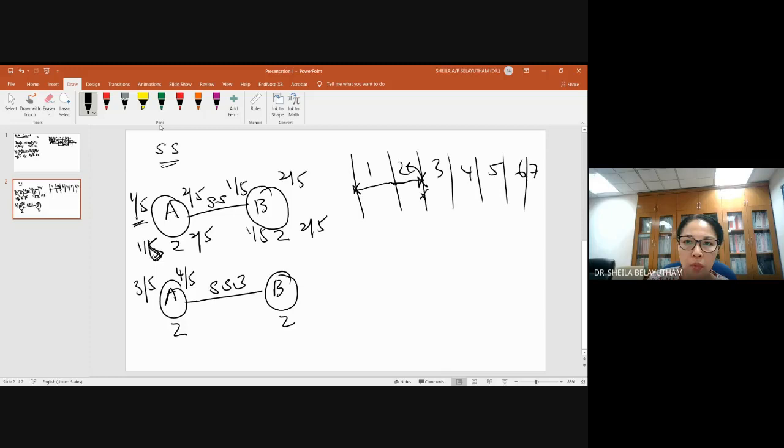Alright, so we start here. Okay, so start to start 3, which means B will start 3 days after activity A started. So activity A started here. 1 day, 2 day, 3 days. 3 days after, it shows the start of 6. Okay, so activity B should start 3 days after. So it will start on the 6th. Okay, so 2 working days, it will finish on the 7th.